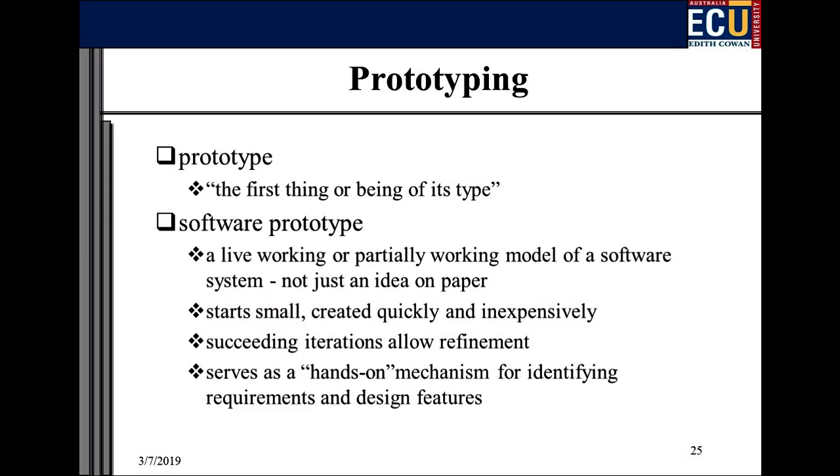Prototyping basically means you create a very rough prototype, as fast as you can, to show functionality, with the goal that you're going to throw this prototype away because you've made it so rapidly and so hurriedly that it's not going to be maintainable. If someone looks at your code, they're going to have a heart attack. So the aim is you get something to show to the client, yes, this is what we want, and then you make the real thing.